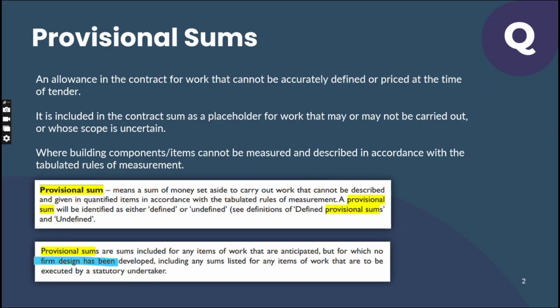Then they would say, let's do something. Let us take out this landscape and keep it as a provisional sum item for the time being. Then we will look into value engineering and design optimization, I mean in the post contract stage. Because if you wait now, your RFP will be delayed, as you would have to spend 4 or 5 months in redesigning, optimization, value engineering, everything. Instead of that, you would say, for the time being, let us keep landscaping as a provisional sum item and then issue the RFP.